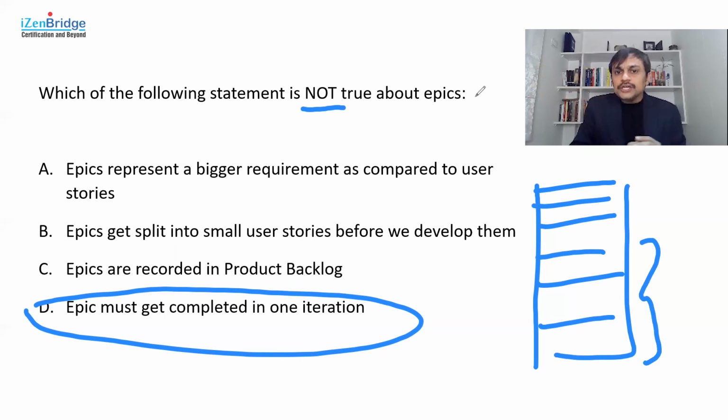So I should not be creating a very refined, detailed product backlog 3 months or 6 months in advance. Because if I do that, whatever I work on this week or next week, and whatever learning I discover, I am not including in that backlog. So I do it just in time, and we can identify what that just-in-time rigor is for a given project.